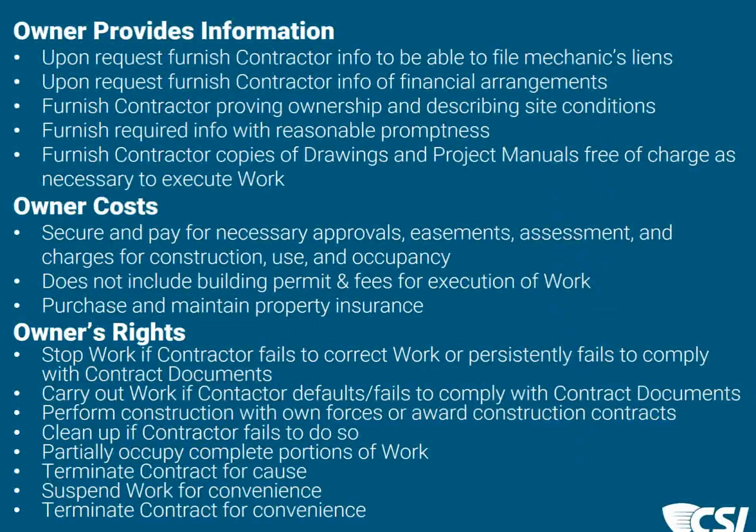There's usually an understanding early in the project that a portion of the work may be occupied. But sometimes it occurs over the life of the job that things have gotten behind. Areas of the project are occupiable and certainly would make things easier for the owner to ramp up their operation if they took partial occupancy, and they have that right if they choose to.